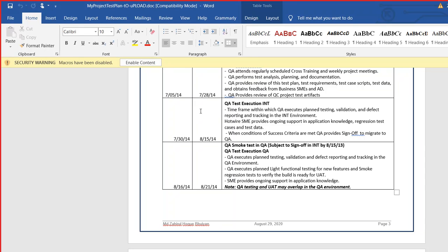Okay, so basically it is a schedule. The way you prepare it, you have to have the key functionality here: development, software, QA people, QA planning, writing test cases, and then software QA execution, right? And then UAT, user acceptance testing, and performance testing execution, and then a go no go meeting, and then the software goes for production. So this is the schedule.